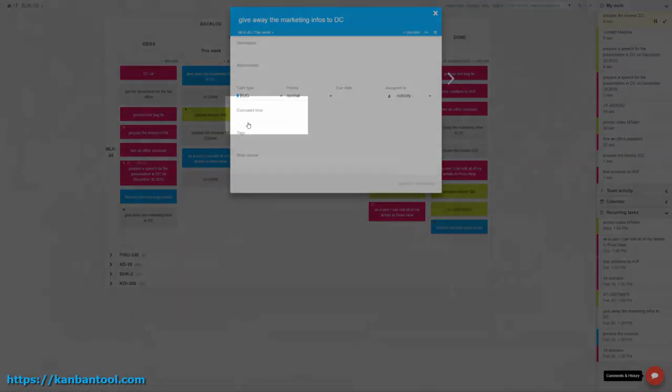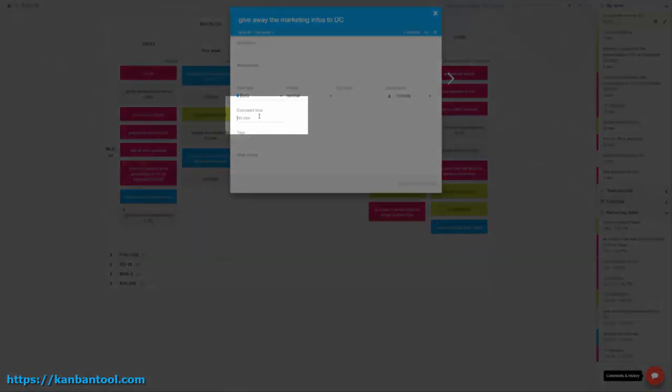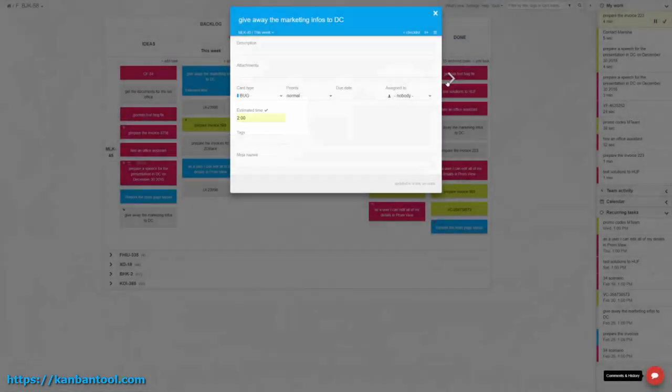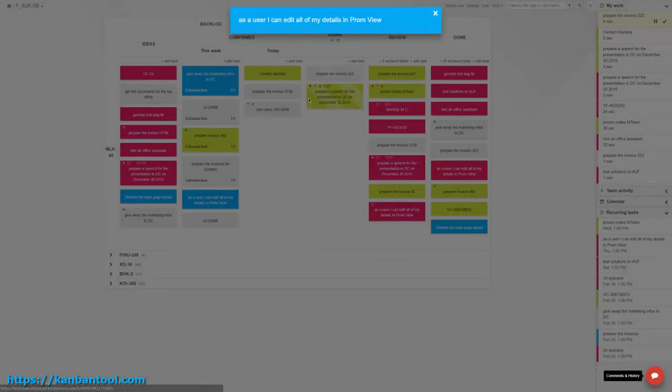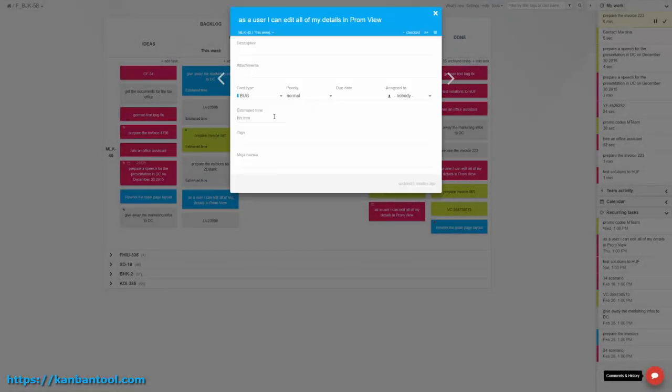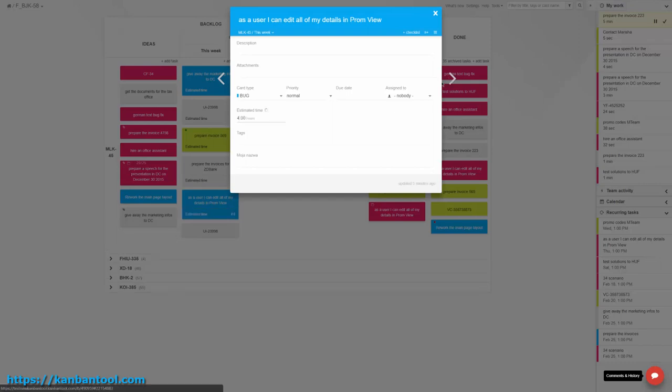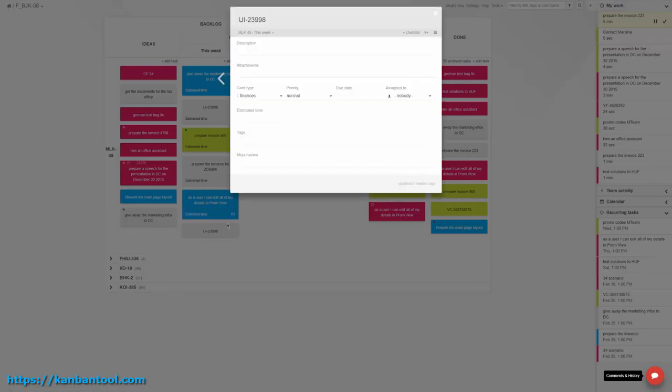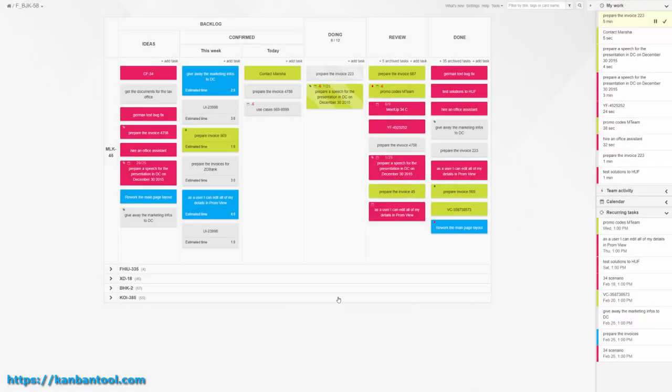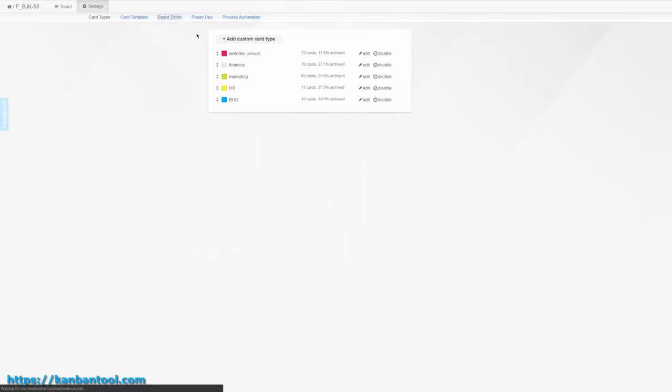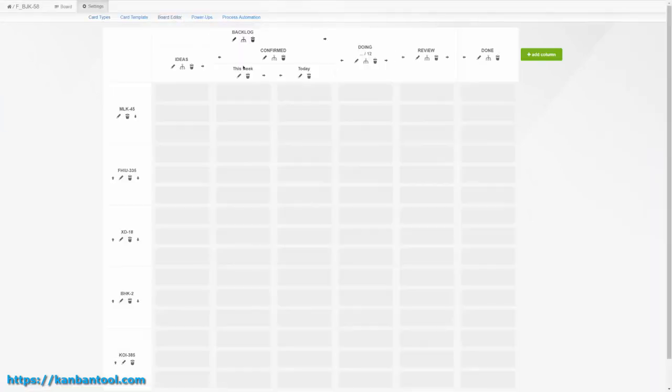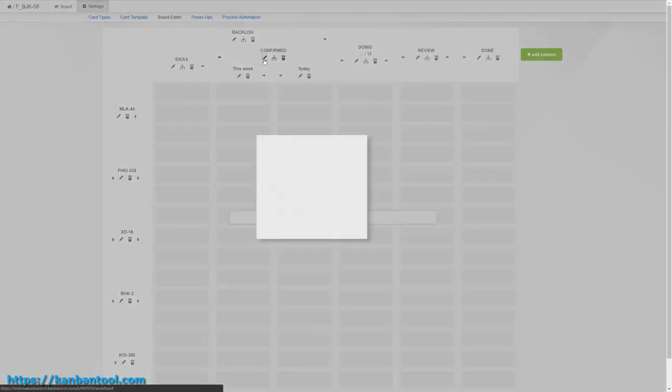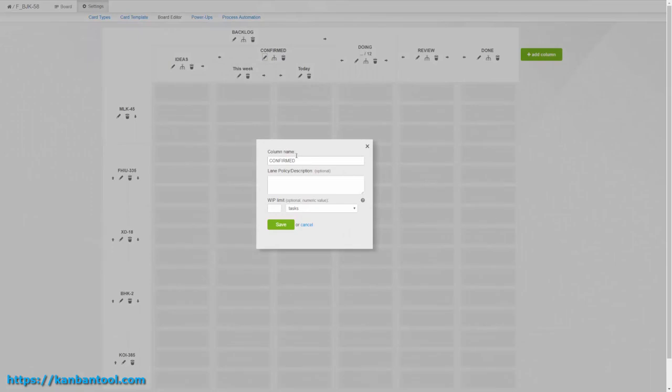Finally, it may be possible to limit the number of items allowed in the inventory based on the team's weekly capacity. Knowing that there are six people working every week, 30 hours each, gives you 180 hours to assign to planned tasks. So why not estimate each task in hours and limit this week's backlog by this maximum available number of hours?